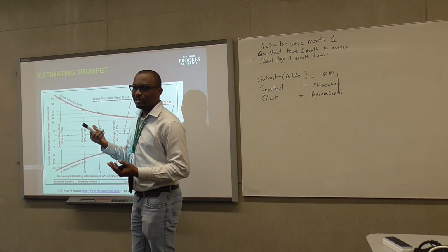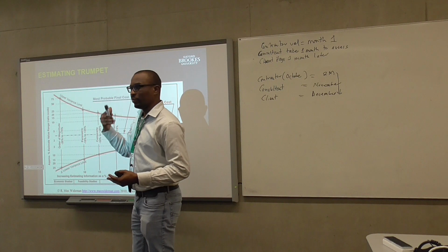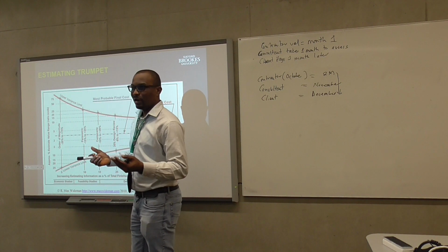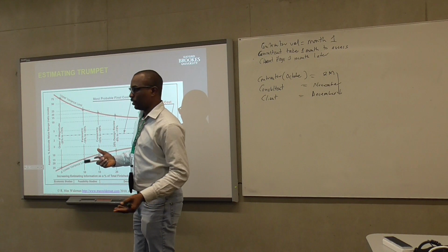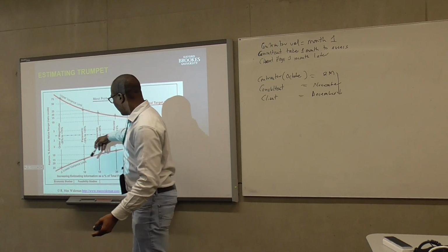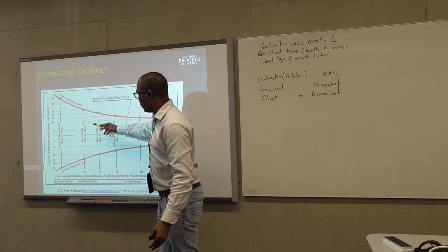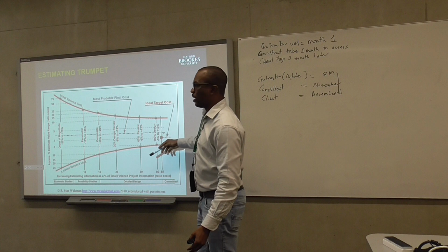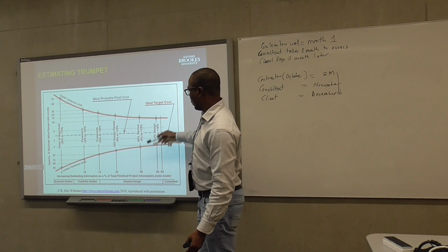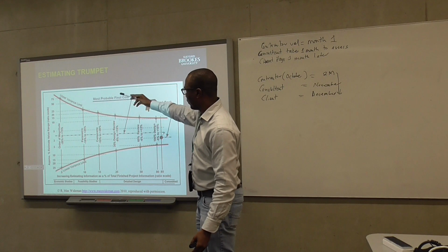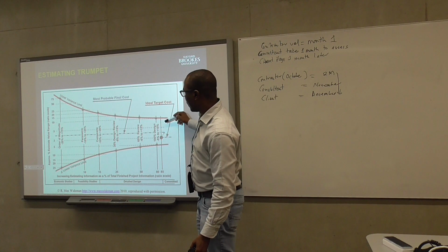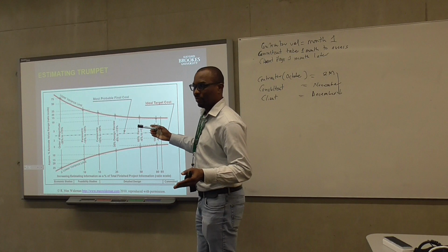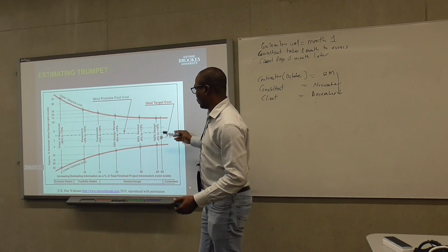Or sometimes idea stage, oh, I probably want to do a 1,000 square meter office building, and I think an office building costs an average of £2,000 per square meter. So as you go on, when you get to feasibility, the gap closes, and then as you come right up to detailed design, it closes much more, from maybe about 75% variance to somewhere around 10% variance in terms of your cost estimate from your forecast to your actual.